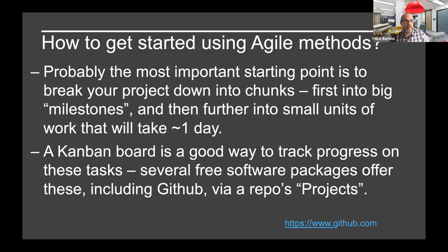I think pretty much every project I work on now, we'll have a Kanban board. We'll break the tasks down, and have a to-do, doing, done, review section. So several packages offer this. And one of them, if you're using GitHub anyway, is that every GitHub repository has a projects tab. And this you can easily set up to be a Kanban board.